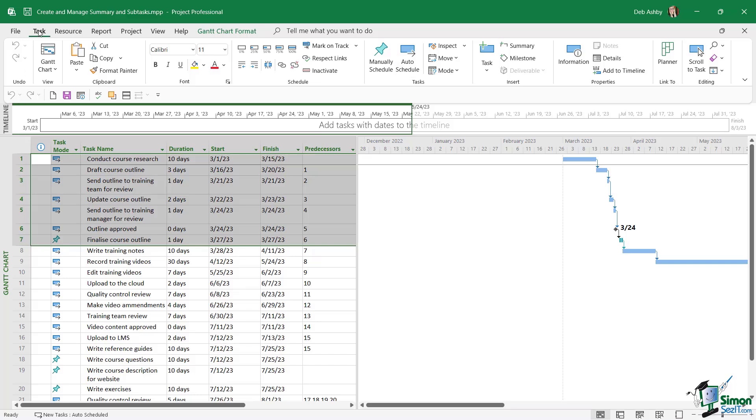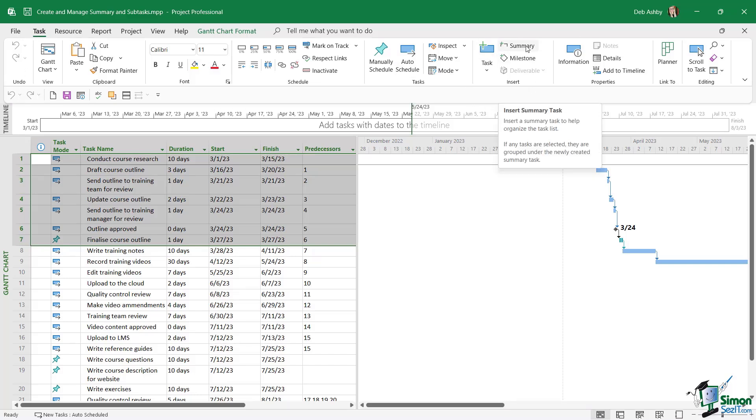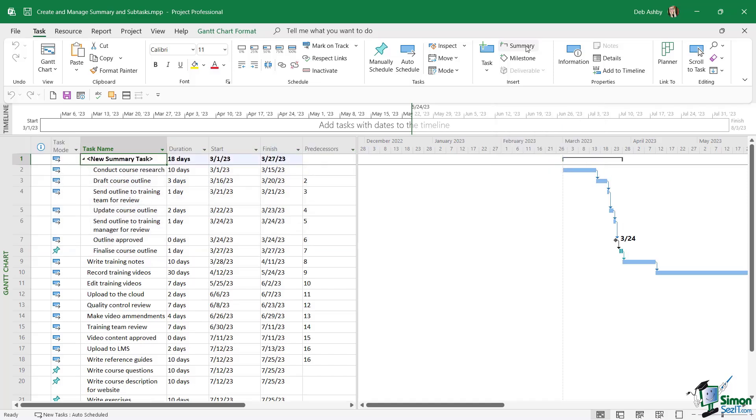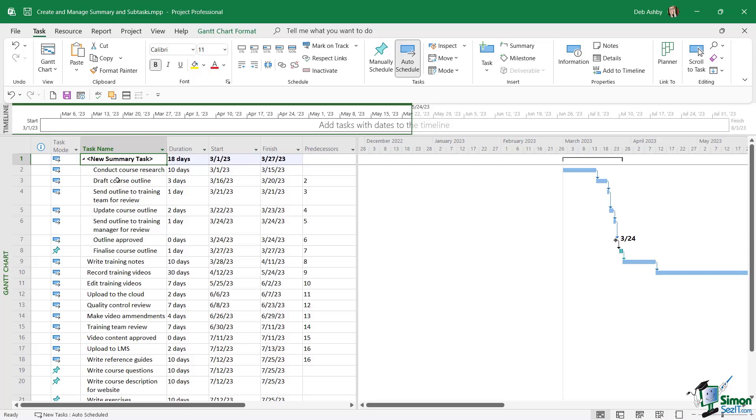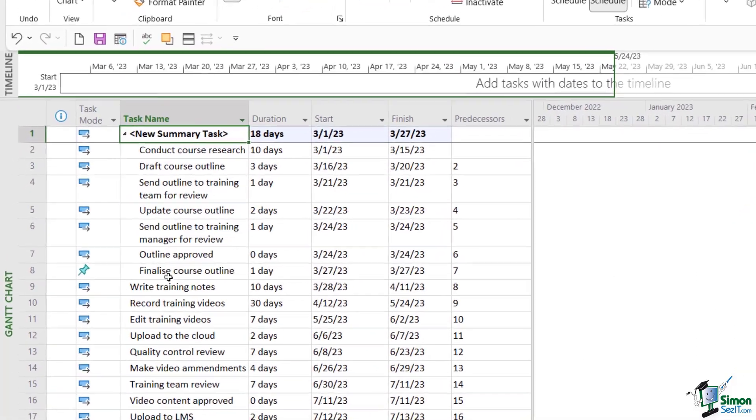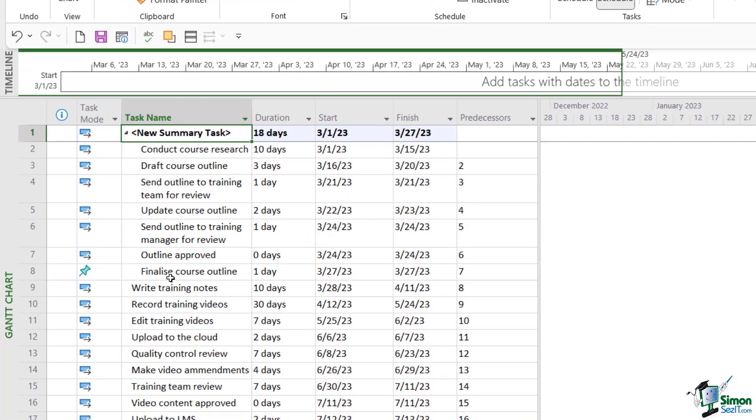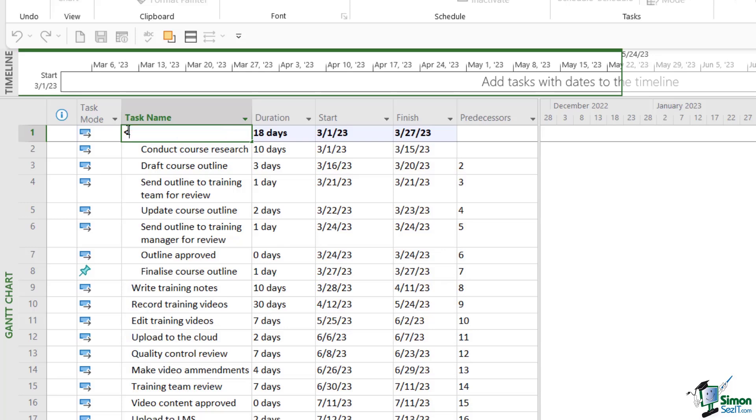Let's go up to the task tab and then in the insert group, we have a summary option. And this is going to allow us to insert a summary task. Now check out what's happened to our table just here. We now have new summary task at the top and the other tasks are now effectively subtasks of this summary task. So let's give our summary task a name. We can click in the field and this is going to be called preparation phase.